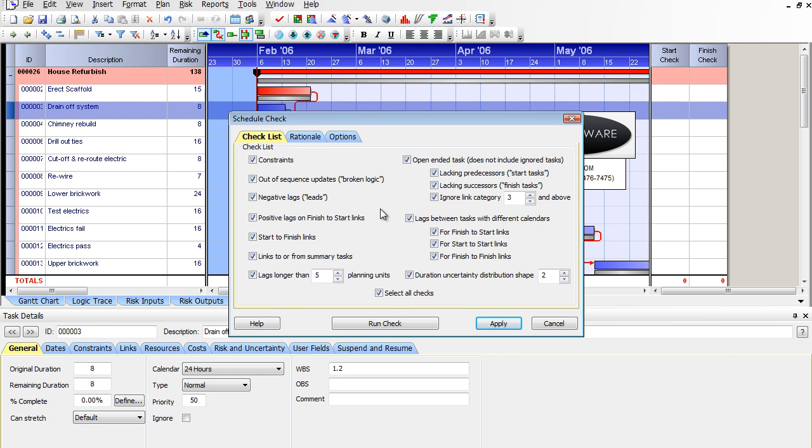So if you cannot use negative lags, it's important to do something else, like maybe putting in some kind of ladder logic, maybe breaking the activity in two parts and linking it properly. Even though that creates more activities, if the end of an activity drives something, you cannot use a start link. It's not actual logic, and the Monte Carlo is going to see that.